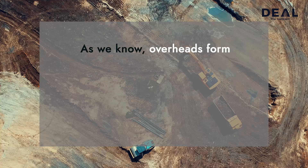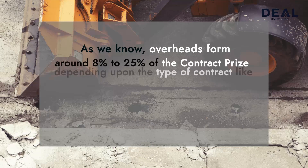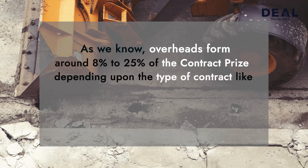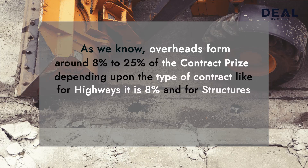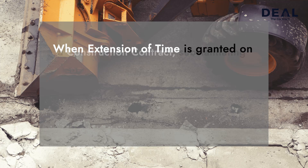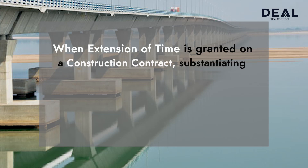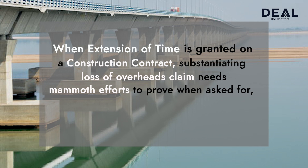As we know, overheads form around 8% to 25% of the contract price depending upon the type of contract — like for highways it is 8% and for structures it is to the extent of 25%. When extension of time is granted on a construction contract, substantiating loss of overheads claim needs mammoth efforts to prove when asked for by the authority.